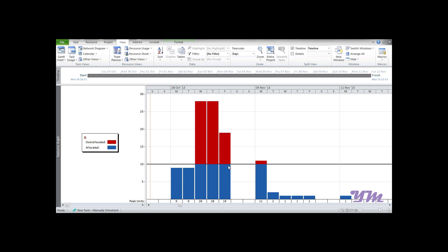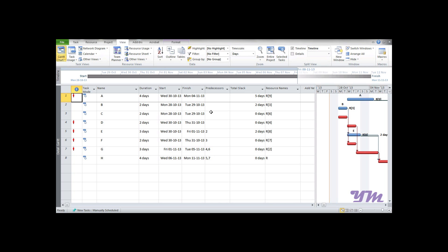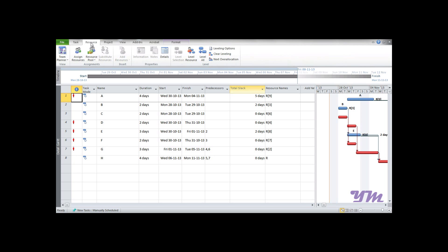A manager would efficiently redistribute these tasks without affecting the duration of the project, and that can be easily done with the resource leveling feature. Let's get back to Detail Gantt Chart. You can see we have slack available for some of these days for A, B, and E. Delaying these activities would not affect the overall project cycle. One way to settle this is by using the slack, readjusting activities so some work can be carried out on other days.